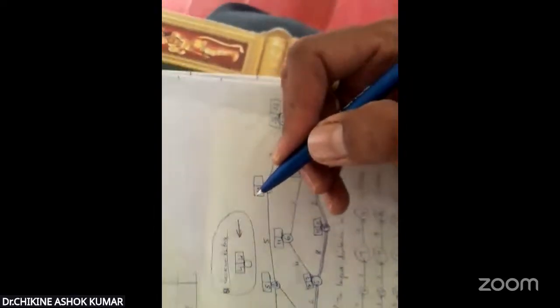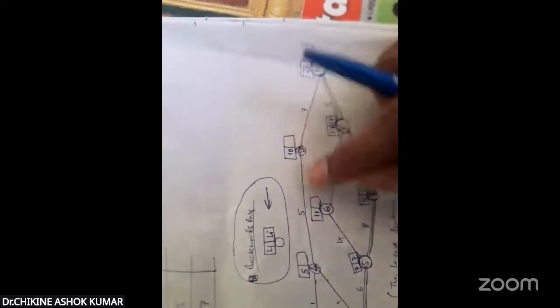This is all forward. Earliest starting times are filled: 4, 5, 11, 10. Okay. Now still we need to fill the second box values. So we have to come in the backward process. That is latest starting times. Now coming to the latest time, by taking a subtraction in reverse order, we have to fill this.